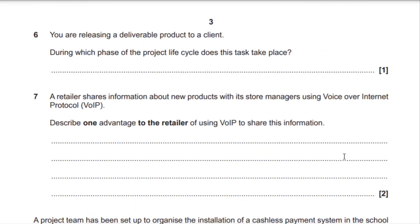Question 6. You are releasing a deliverable product to a client. During which phase of the project lifecycle does this task take place? A common mistake here: it's not asking when the deliverable product is created — it's asking when it is released. The answer is evaluation. Your deliverable product is released in the evaluation phase, after testing and evaluation. It is not released in the execution phase.